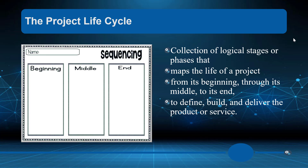A project maps the life from beginning to middle to end. A large project we'll break up into many beginnings, middles, and ends that coincide — done sequentially, where task two starts only when one finishes, or cooperatively, where one, two, and three are worked on together but two must be done before we can implement four. So concurrent production of different parts of a program — we'll get into that more.